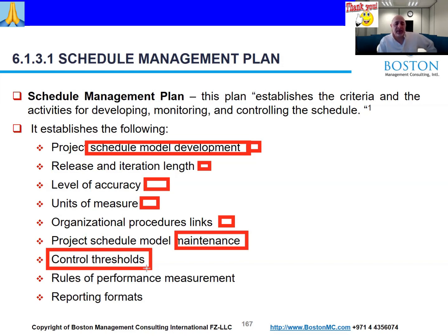If you have a 5-day task, if you think you're going to be delayed by a day, even a day, I want to know. The reason is I may have a depending activity that a contractor is doing that's waiting for you to finish. So if you're late, the contractor is going to show up as planned if we already agreed with them and you haven't finished. So I really want to know. But this usually happens on a smaller project when I'm talking about days.